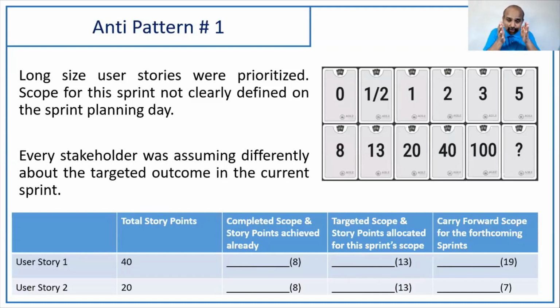Likewise, that particular scope needs to be defined. Otherwise, what happens is the product owner or other stakeholders come to the meeting and say, I expected you to complete 6 features, but you're only showing 4 features. Then people say, no, the other features we completed last sprint itself, these features we want to complete next. Some kind of confusion will come. So we should avoid it.